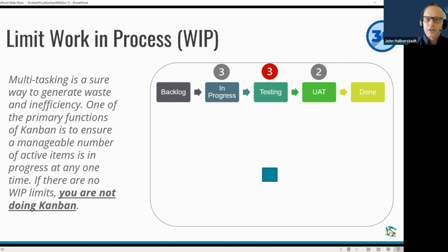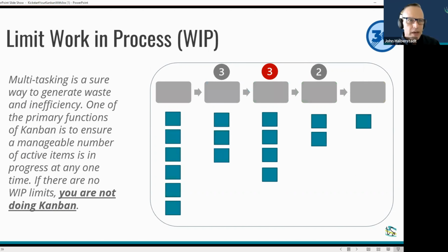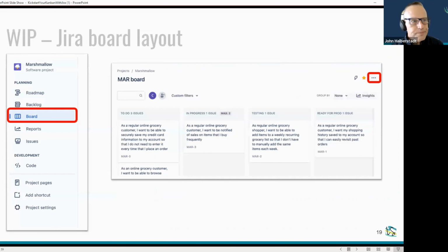And I know this is largely East Coast, so maybe nobody gets that reference, but we don't generally stop at stop signs. But Cate's example, as far as the WIP limits we have here, so she talked about the columns, but her point I couldn't agree with more. With new teams especially, it's like with any other metric, until you know what the numbers are, don't set goals. You have to baseline them first, and then you can start suggesting ways thoughtfully. Otherwise, you're going to do a WIP limit of 1, and then everyone's going to ignore it because you'll never be able to adhere to it. So start assessing what you've got today and then make incremental changes.